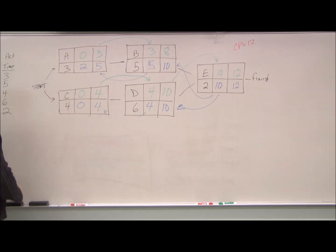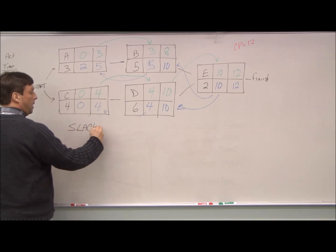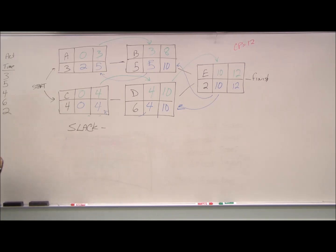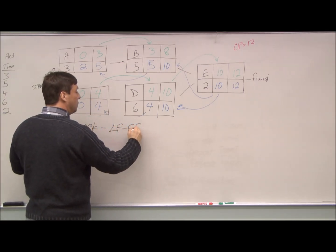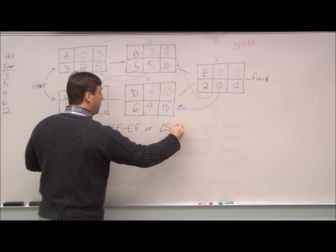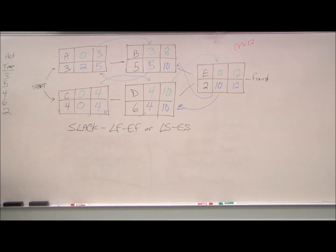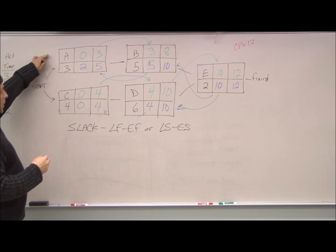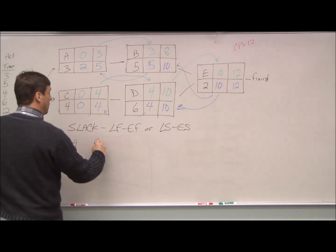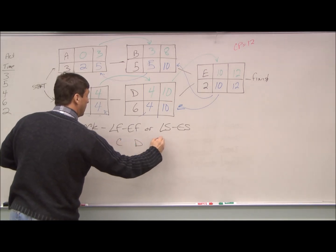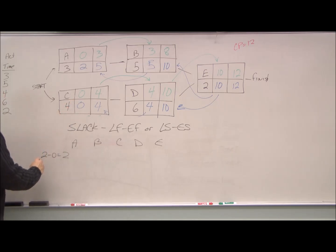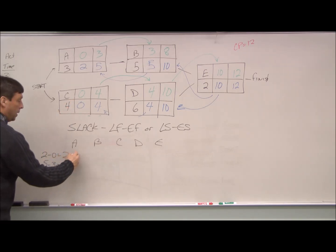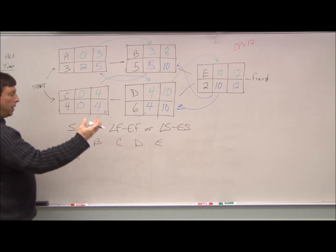The next thing we can calculate is slack. How much extra time do we have at any given operation? And slack can either be the latest finish minus the earliest finish, or the latest start minus the earliest start. You notice that the numbers will give you the same results. For example, for A, if we wanted to calculate the slack, we could do two minus zero, which is equal to two. Or we could do five minus three, which equals two. Again, just showing that it doesn't matter how we calculate it. Either way, the numbers are equivalent.